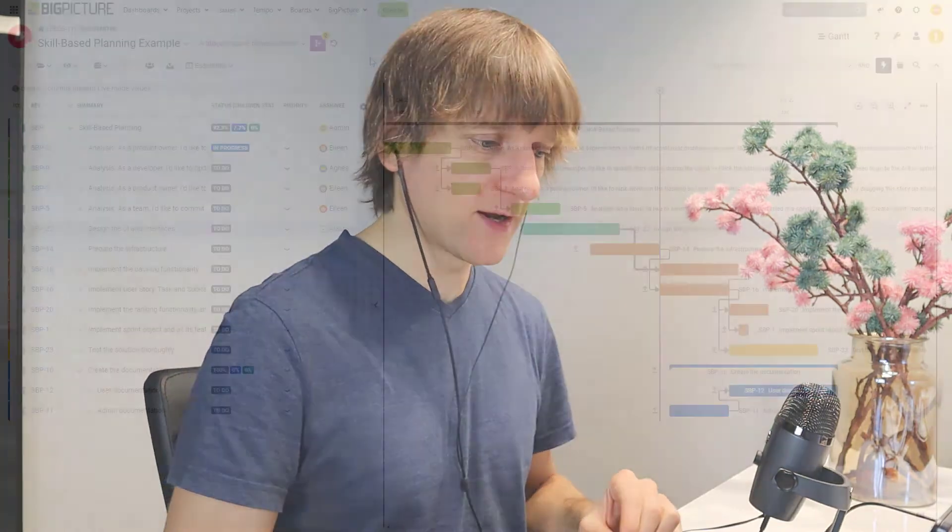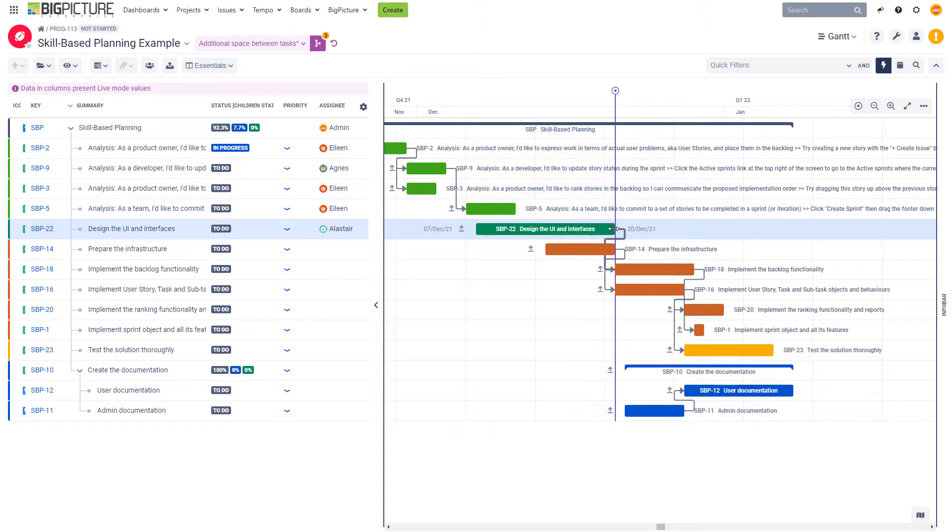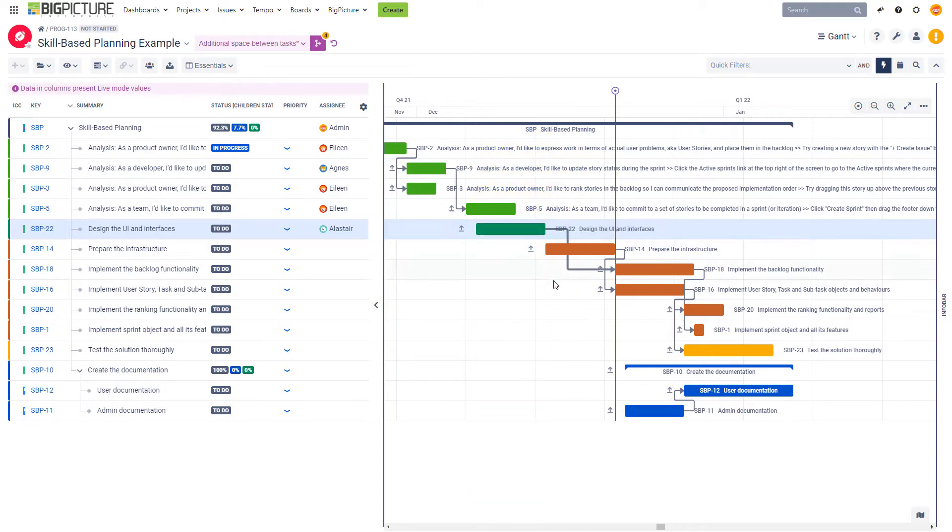We saw our project plan items being moved on the timeline. What about making them longer or shorter? Is that possible as well? Of course it is. To extend the task, just grab the end or the beginning of the task and move it to that desired spot. I could also make the task way shorter than it should be, so that will also work. As you can see, replanning your project items is really easy and absolutely doable with what-if scenarios. But what happens if you want to do a little bit more?